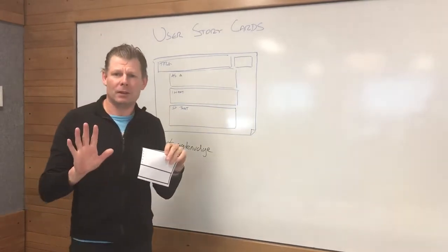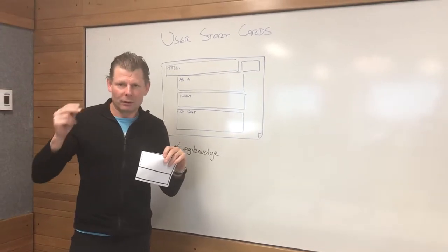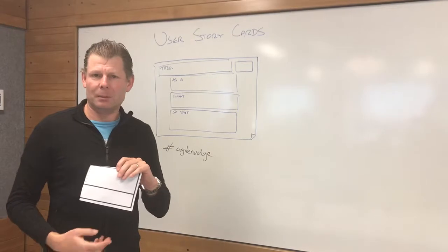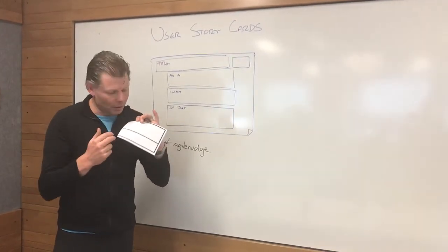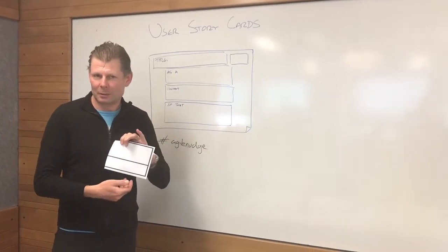We only have 5. Now, obviously, in the online version of the tool, you will have all of the acceptance criteria. You may have given, when, then, or you may have spec by example. But here, we just want the high-level acceptance criteria, maybe the things we exclude, just so we have a shared understanding of what we're going to be estimating.